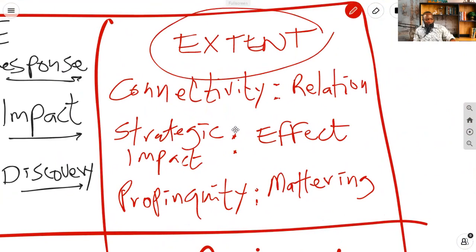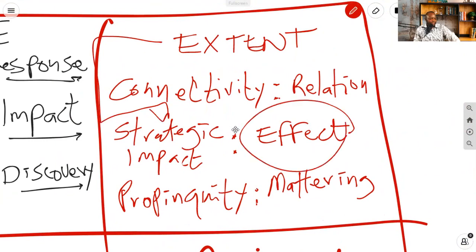The final category is extent. The extent to which a risk is related to other risks. It says, the extent to which the risk is related to other individual project risks. Where a risk is connected to many others, connectivity is high. The next one is the extent to which the risk has an effect on the company's strategic impact. It says here, the potential for the risk to have a positive or negative effect on the organization's strategic goals. Where the risk has a major effect on strategic goals, strategic impact is high.